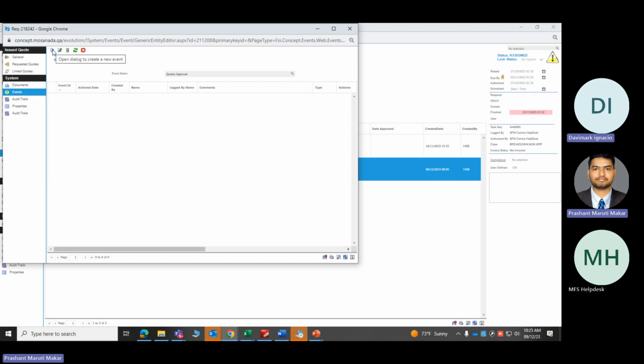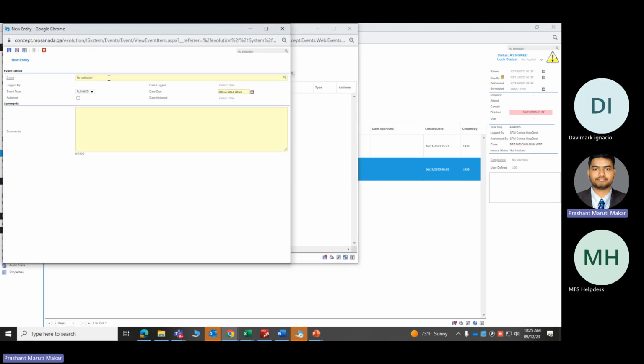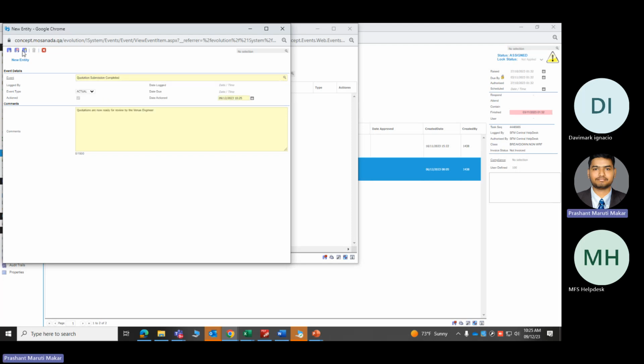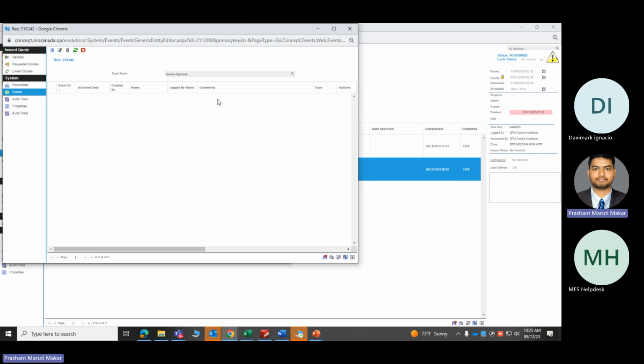So what you are doing, you have uploaded the quotation. Now you are submitting the quotation. So from here, you will add the event as quotation submission completed, and you will save and close. That's it. Your job is done. The quotation has been submitted.